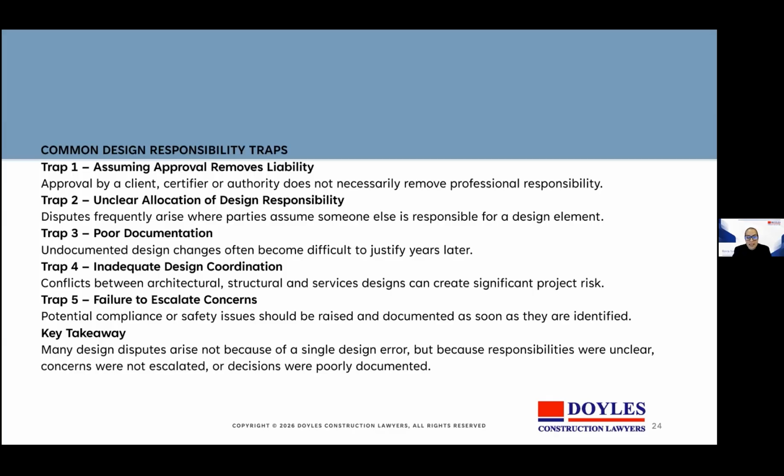Trap 4. Inadequate design coordination. Conflicts between architect, structural, and service designs can create significant project risk. And so it's important to watch out for these 5 traps. Assuming approval gives immunity, unclear responsibility, poor documentation, weak coordination, and failing to escalate. Most disputes come from the process, not just the error.